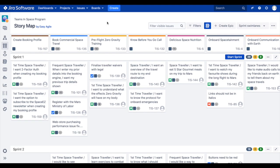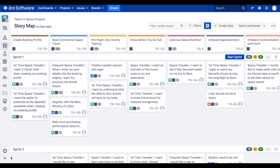We're also able to change the swim lane type on our story maps by clicking on the swim lane drop-down in the top right-hand corner. When a scrum team first opens their user story map, they will see their story map sliced horizontally by sprint swim lanes pulled directly from their agile board. This is what we've seen here in this demo so far.